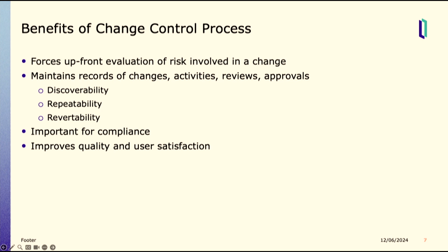Repeatability, because we document the process of making a change. If you start doing something, you get it done in the base or the development and test environment, and then you go off to Global Summit. Someone else can pick it up, and they know the steps to make the same change in production if it needs to happen while you're away.